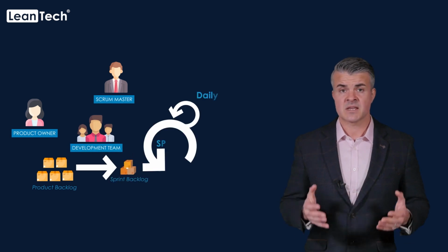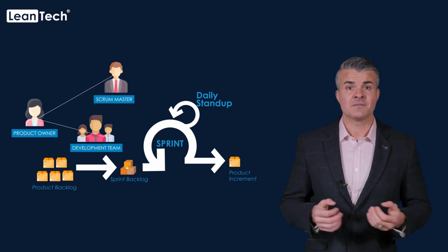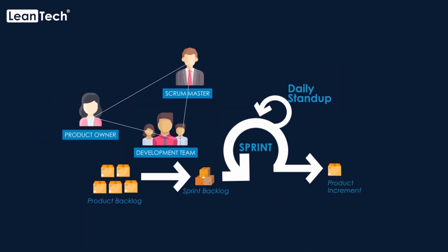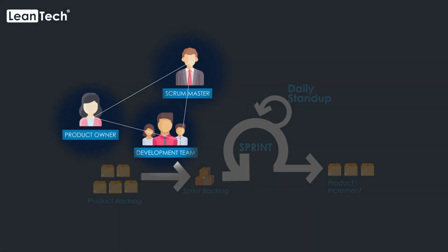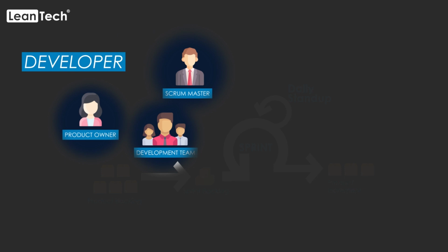The Scrum team is a cross-functional team that consists of a Scrum Master, a product owner, and developers. Cross-functional means that the team has all the competencies they need to create value for each sprint. Therefore, the term developers here refers to anyone who works to develop the product. This could mean that their core skills are in design or business analysis, for example. The reason for this naming convention is to promote collaboration.